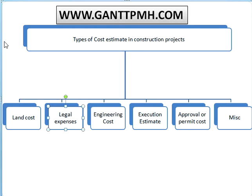For land cost, the client — the one who is going to complete the project — hires individual consultants or experts, either from within his team or from outside support. For land cost specifically, we consult with property dealers or land expertise professionals. They provide us the actual land cost and what sort of other expenses we can expect.